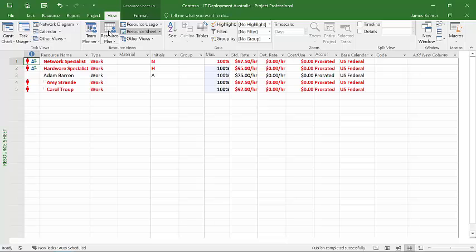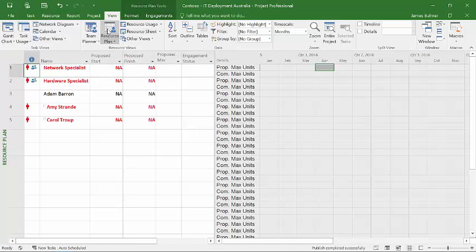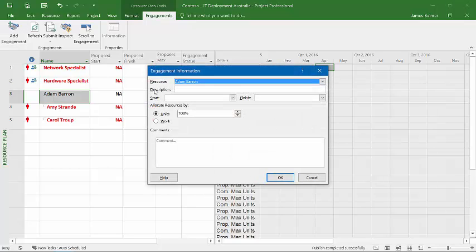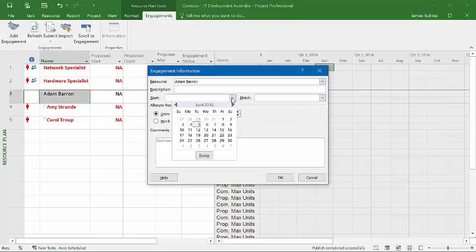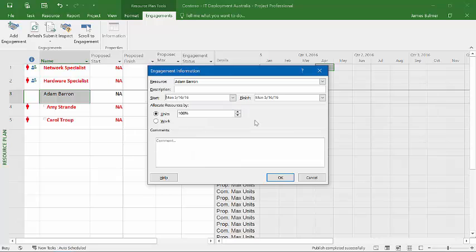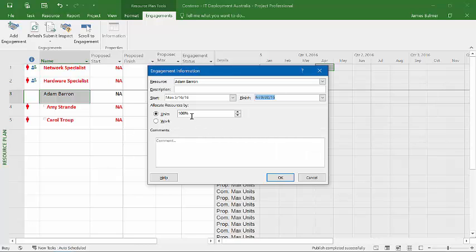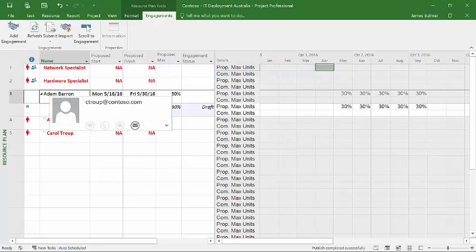And now I can go to create a resource plan. At this particular point in time, I don't want to assign resources to specific tasks. I just want to have a general overall understanding of the work that the resources are going to do in this particular project. So basically, what I do is I create a resource plan. And basically, what I do is I can go down to Adam and I can go over to engagements. I can add an engagement and I can say that he's going to start on May the 16th and we're going to need him for May, June, July, August and September. And we expect to need him about 30% of the time. So I create an engagement for Adam.